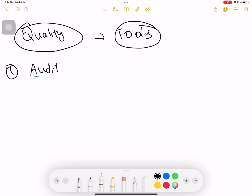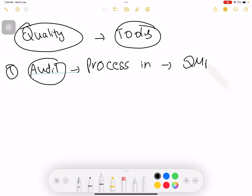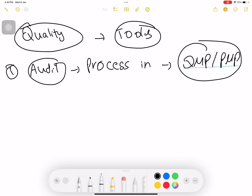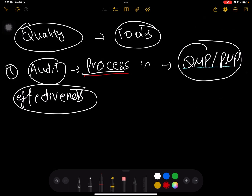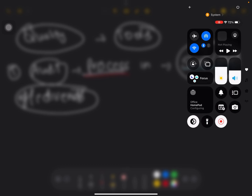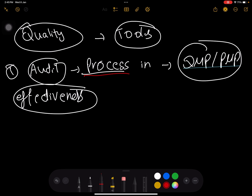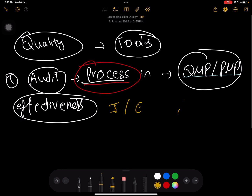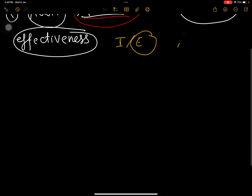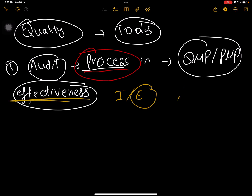First of all, audit. Audit is a process in which we actually check whether we are following the quality management plan or project management plan or not. It checks the effectiveness of the process — it has nothing to do with the actual deliverables. It is only checking whether we are following the right process or not. Audit can be internal or external, but the recommended orderly audit is external — a third party from outside the organization.